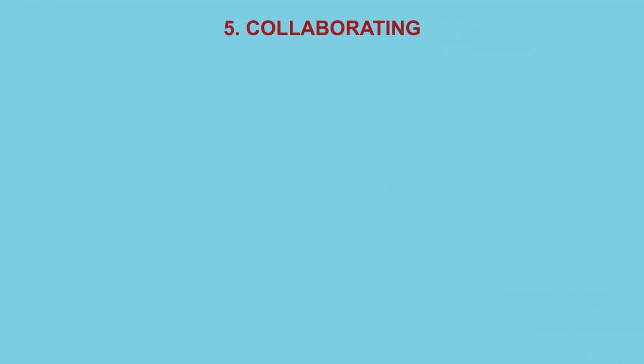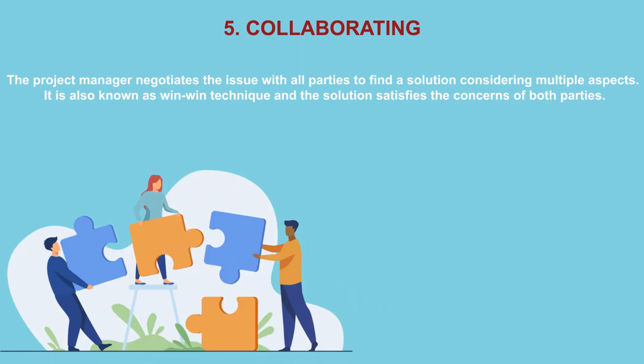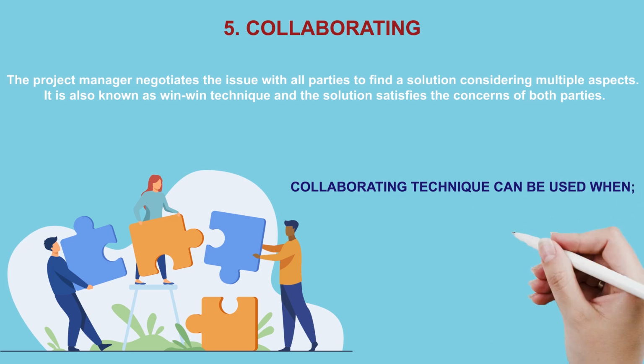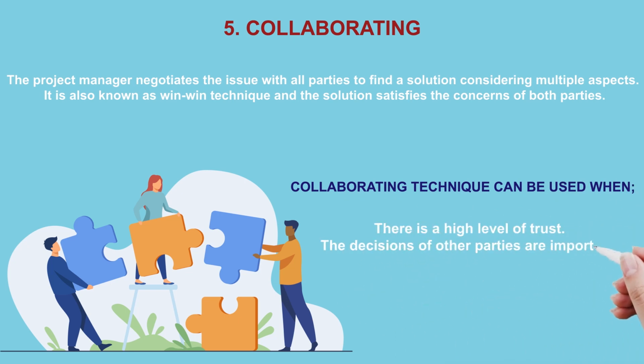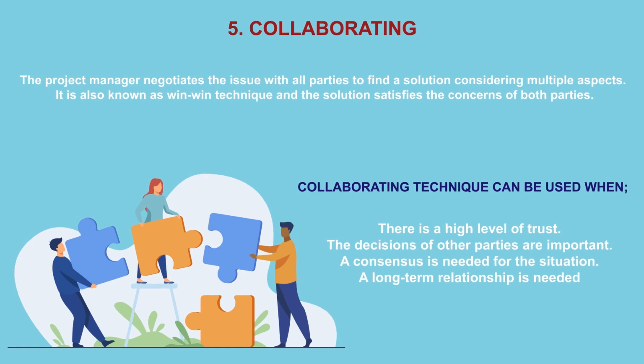5. Collaborating. The project manager negotiates the issue with all parties to find a solution considering multiple aspects. It is also known as the win-win technique and the solution satisfies the concerns of both parties. The collaborating technique can be used when there is a high level of trust. The decisions of other parties are important. A consensus is needed for the situation. A long-term relationship is needed.